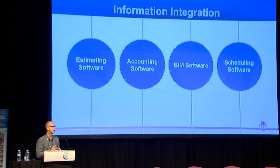The other thing I've learned about data is that more detail doesn't mean more accurate. It definitely means less accurate a lot of times. If you get beyond the point where it's too much detail, it will absolutely not be accurate. So we've actually cut that all the way down. Right now, the complete number of combinations in our work breakdown structure, if I disregard building and area, is about 300 combinations that could possibly apply to any project in our whole company. And then you have BIM software, and in the BIM software, very few people are coding the items at all. They don't get the code. There's a real problem with that, though. I can't gather data from it if I don't code it.